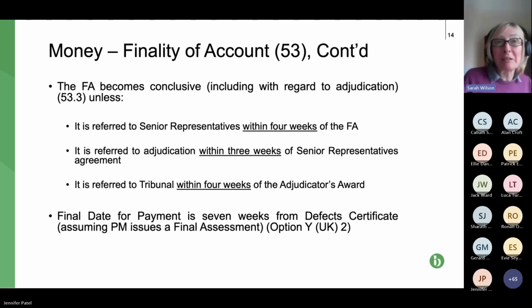They'll do it because that's what we do, but it won't be such a good product. And of course, the whole advantage of adjudication is if you're starting the process, you've got that time to really produce a good, clear document, to really clearly explain to the adjudicator what the claim's about, and make it really simple for the adjudicator to find in your favour. So don't tie your own hands behind your back by leaving it too late.